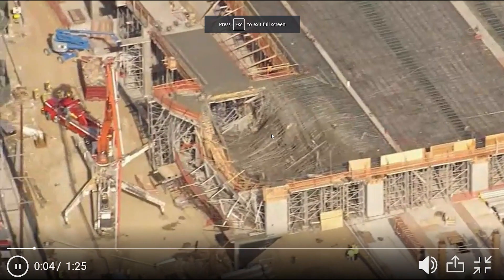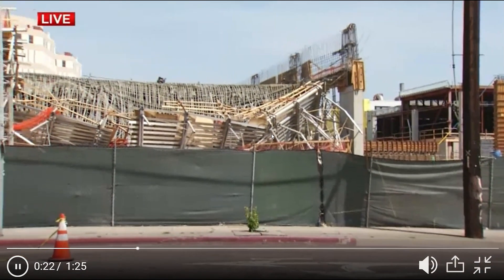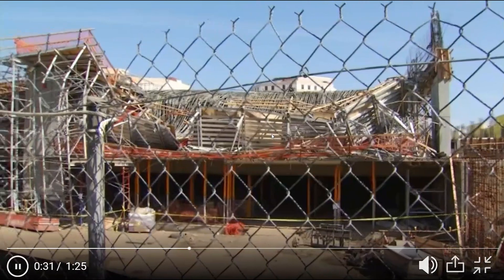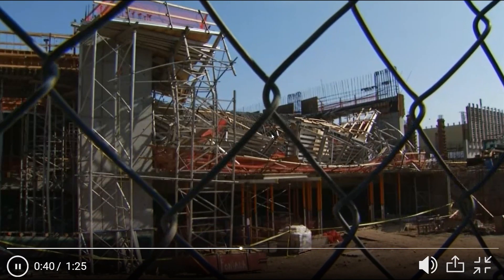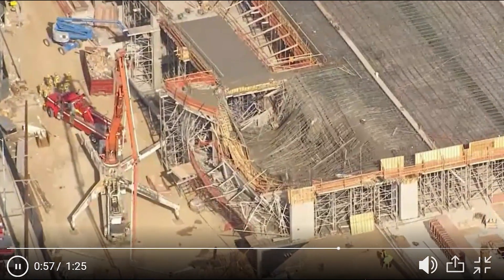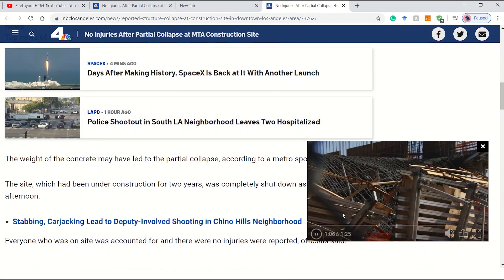If it's a tower crane, neighboring properties will be affected, but if it's a formwork failure, usually your own laborers or suppliers' workers will be injured. Here is a news example: a reporter arrived at the scene of a massive construction accident downtown, where a two-story parking garage collapsed. The construction site was shut down. Fortunately, no one was injured when part of it collapsed just before nine o'clock, as they were pouring concrete. A safety inspector heard something, and the weight of the concrete led to a partial collapse. About 150 people were on site with no injuries. However, the partial collapse will likely delay the project that was scheduled for completion in January.